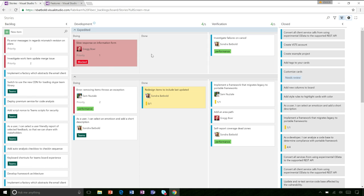And why are there two different lanes across the board? The two different rows are called swim lanes. Swim lanes allow you to group work across the same process but separate features or higher priority items. In this example we have an expedited lane, which basically tells the team: hey, this is something important, it's a P1 bug, make sure we pick it up.